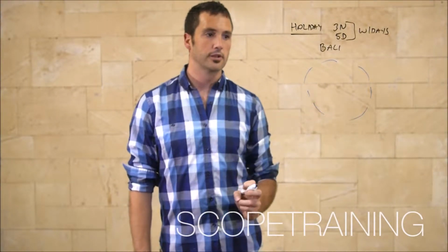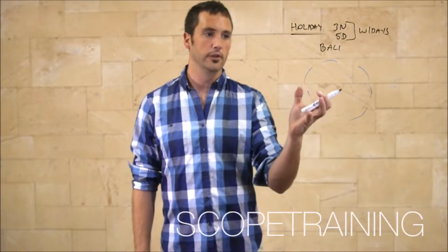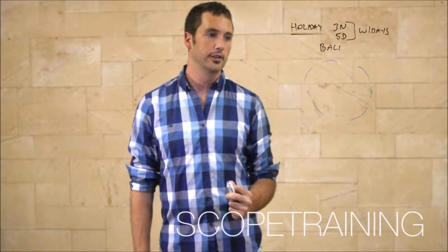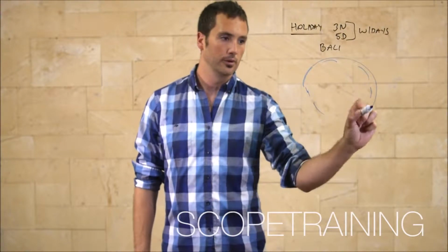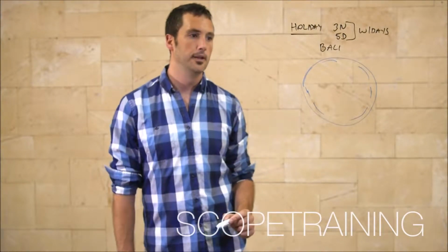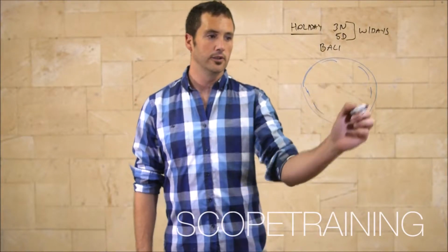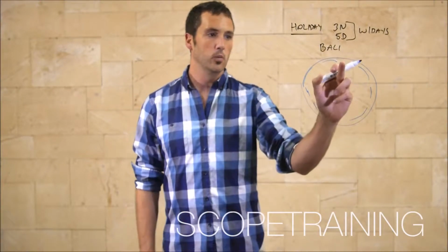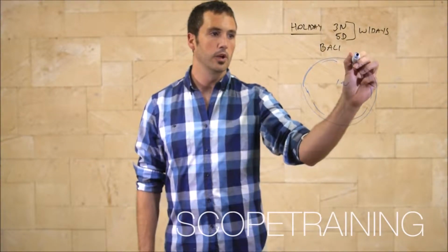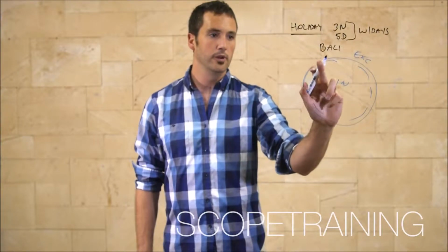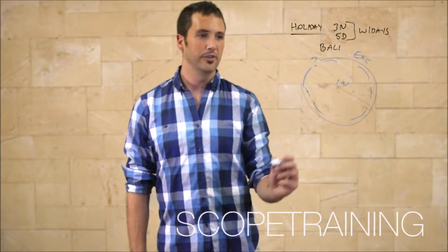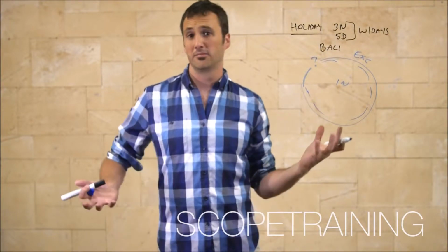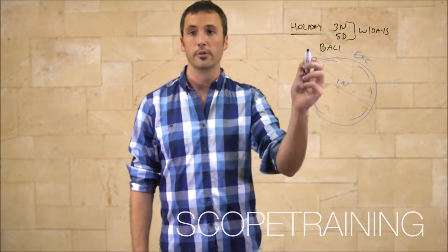And what the scope matrix does, it enables us to define the scope to a greater extent. And it gets us from this to this. And what we've got is a scope that's well defined. We know what's included and we know what's excluded. Every time there's a gap here, that's a question mark. That's someone saying, well, flights, are they part of this project, yes or no?